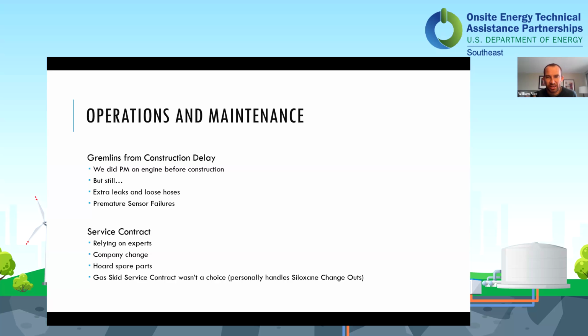And then the last thing we sort of learned was that the gas cleanup was a different package. So Adil talked about that earlier. The gas cleanup oftentimes with the gas production may be different from the actual CHP system. And so figuring out how to get those systems to line up is tricky. We wanted to have a service contract for our gas cleanup provider, and we called them up, and they said, "Oh, we don't do that. We can send you the sales guy, and he can tell you how to do stuff."